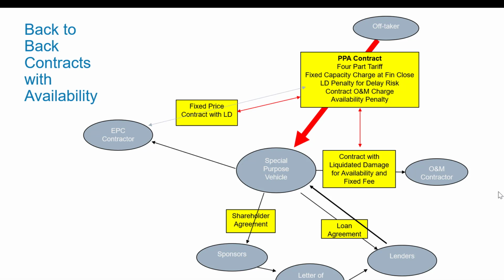They define how much capital you have to put up because you're going to be taking some risks. And the same sort of thing you could imagine: the O&M contractor has to put up some capital, and then they have to figure out what's the likely chance that there'll be some unavailability here that will transfer down to them. That's the big issue. And the EPC contractor, there could be some of the same kind of liquidated damages penalties from the concession agreement, and that would have to be passed on to the contractor.